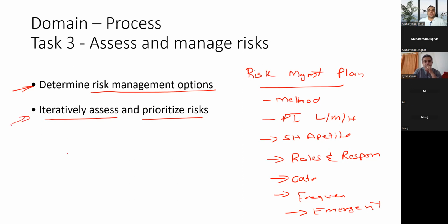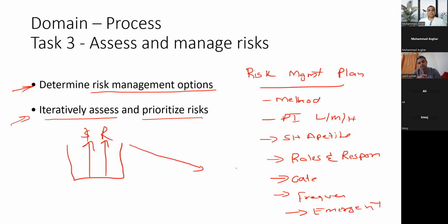And the second one is reflecting this in our backlog, so that the user stories which have the highest value and highest risk will be done first. So throughout the project, we can reduce the uncertainty and risk as early as possible in the project and can deliver the highest value. So you have to keep assessing and managing the risk.